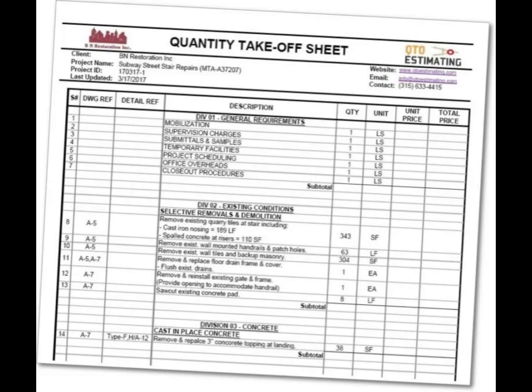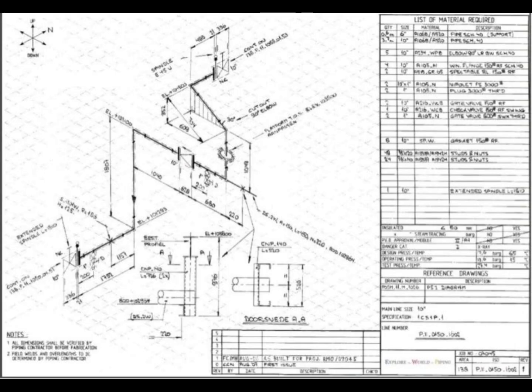Common mistakes to avoid. Avoid mixing drawing revisions. Do not ignore general notes or standard details. Never estimate supports or fittings without reference. Avoid counting from screenshots instead of original drawings.